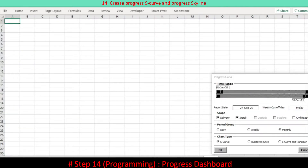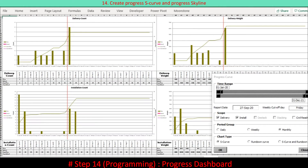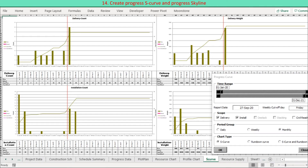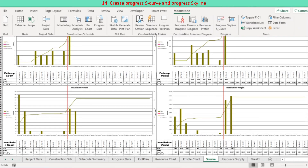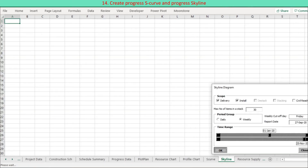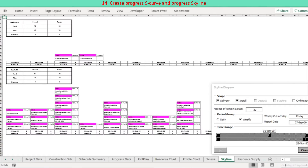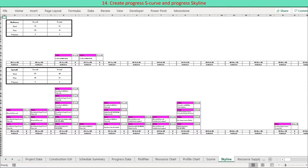Progress curve and skyline are based on activity end date. A conventional progress chart is created consisting of a periodic column chart and a cumulative line chart. The progress chart is presented in the shape of an S curve and a rundown curve. A skyline diagram based on activity end date is generated over the selected period.